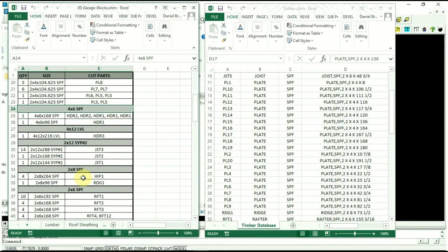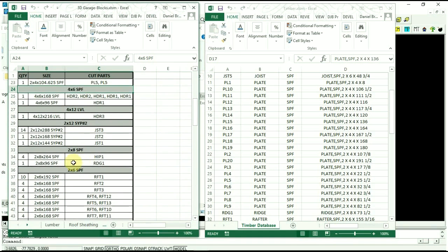and you know exactly what you're cutting from what piece. So you don't end up cutting something from a big piece of lumber and then run across something that needed that big piece that you forgot to cut, and all of a sudden you don't have the material on site that you need. I've run into that before, and this right here solves that problem. And it really gets cost controlled too. It's just a really good system.